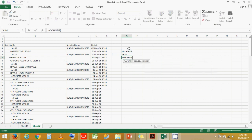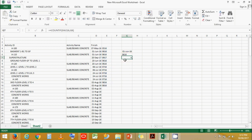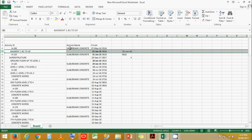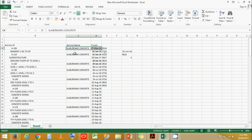Let's do a COUNTIF. Let's select the range and give a criteria. You see that it is showing the June slabs. What it is also doing is converting the slab activity date as well as the WBS summary dates. We only want to keep the activity date — not the WBS summary date. Only keep the activity date.